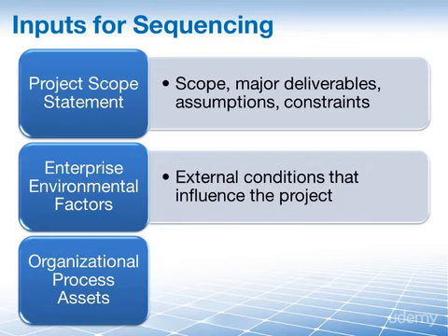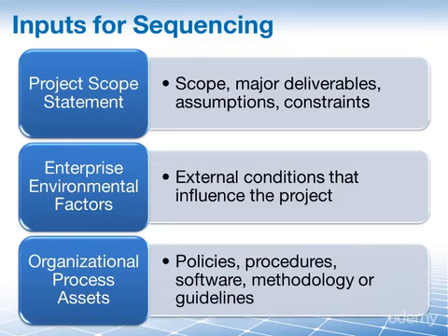You may already have noticed that this is a favorite input and output of the PMBOK guide framework. In essence, every time your organization has some policies, procedures, software, methodology, or guidelines that are general to the organization, then we must rely on them. And for this process here, we may have specific methods for scheduling that we need to take into consideration, or there may be lessons learned files from similar projects in the past regarding sequencing of activities.